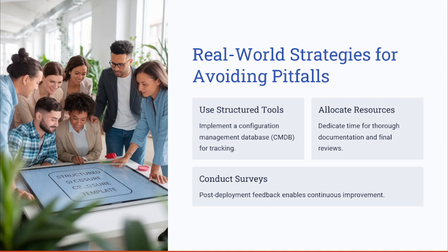And the real-world strategies to avoid these pitfalls: IT project managers should leverage structured tools like the CMDB to track the configuration and dependencies, and allocate dedicated resources to document and conduct post-deployment surveys to help ensure that no critical task is overlooked and no requirements are left behind. These strategies facilitate a smoother transition and foster continuous improvement.